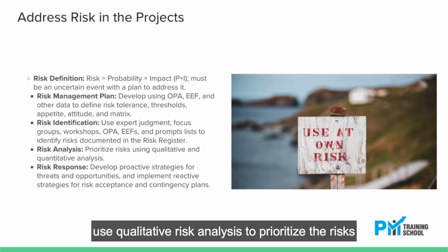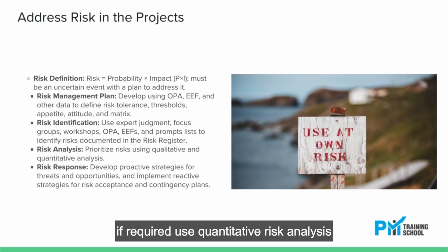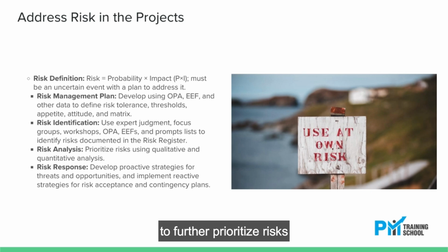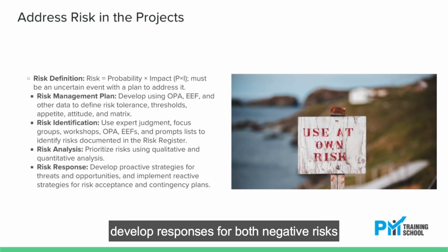Use qualitative risk analysis to prioritize the risks. If required, use quantitative risk analysis to further prioritize risks. Once the risks have been prioritized, develop responses for both negative risks, threats, and positive risks, opportunities.